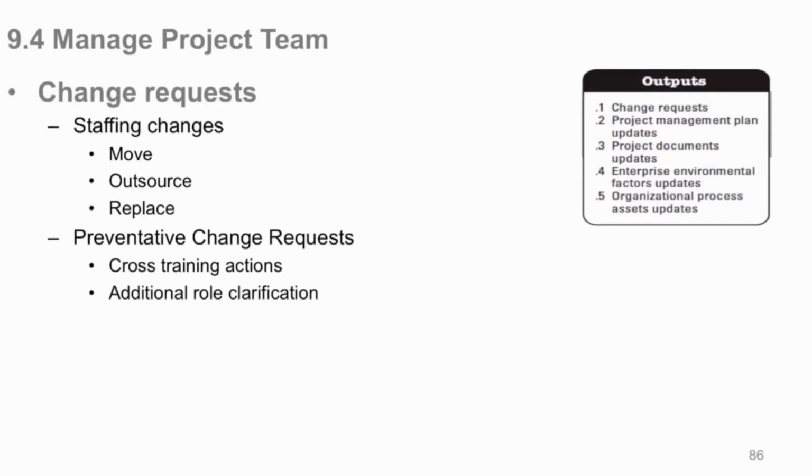Staffing changes, again, even though it's maybe foreign to you in your work, remember you've got to do it the PMBOK way when you answer questions on the exam. So the PMBOK way is if you move, outsource, or replace people, you need a change request to document it. And you may have the occurrence where the change control board says, no, we're not going to let you release that person, or we're not going to bring this person on board, or whatever. So, it's always a good thing to have change requests because you do have a definitive log, you have a definitive reason why you're doing these personnel changes.